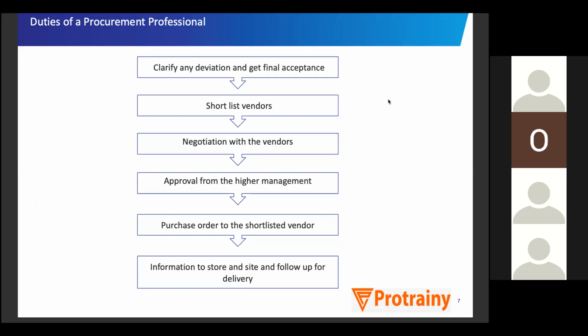No, you have to check that for making 1 cubic meter of concrete, how much admixture of these three different brands is required. One will be used at 4 liters for preparing 1 cubic meter of concrete, one will require 2.5 liters only, and one will require 6 liters. These technical things, those commercial people will not understand. So that's why all the major companies in construction are taking civil engineering guys into their procurement function.